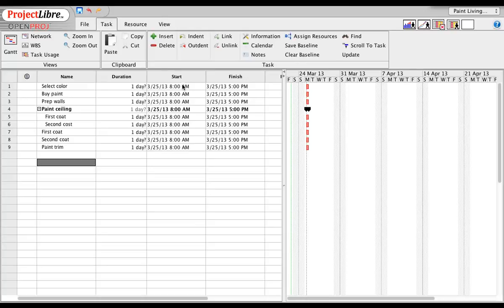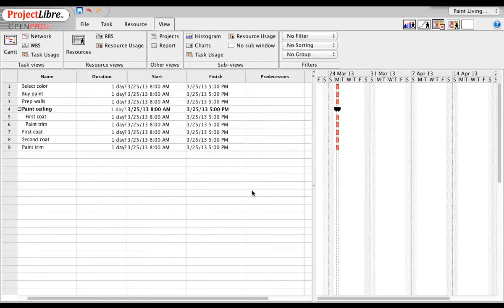So I have to change the days that these are worked on. Even if I had 4 or 5 people working on it, certain things have to be done before other things. So even in that situation, not all these things can happen on the same day and for the same duration. So one way to create the schedule is to manually change the start dates on the start date column.